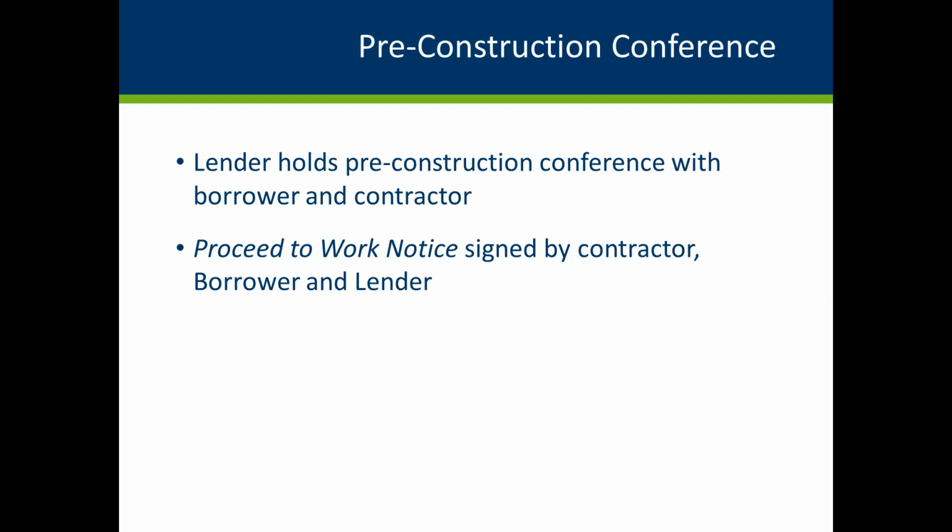This is a good time to revisit the homeowner agreement that the borrower signed at the beginning of the application process. Also, review the proceed to work notice, which is signed by the contractor, the borrower, and the lender. The pre-construction conference is often, but not always, held the same day as the loan closing. Make sure the contractor's current license number is listed on the proceed to work notice, and document the date of the pre-construction conference in the loan file.